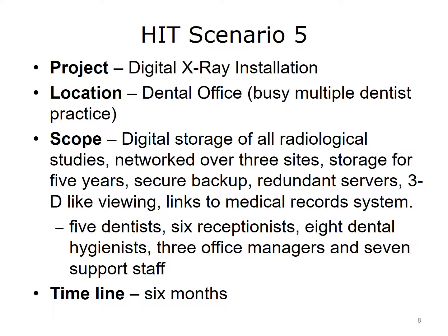Because no one at the practice has the knowledge base to facilitate this type of software implementation, the practice has agreed to use a consultant who specializes in this particular dental installation. In this scenario, security would be a concern because the system will need to network 3 physically separate offices. You would need to think about securing the network against hackers, but also enable disaster recovery. That is, if the system goes down, how can you maintain redundancy between the 3 offices? If the network goes down, how can a provider access radiology procedures that were performed at another office? You will have to answer questions like these before you proceed.